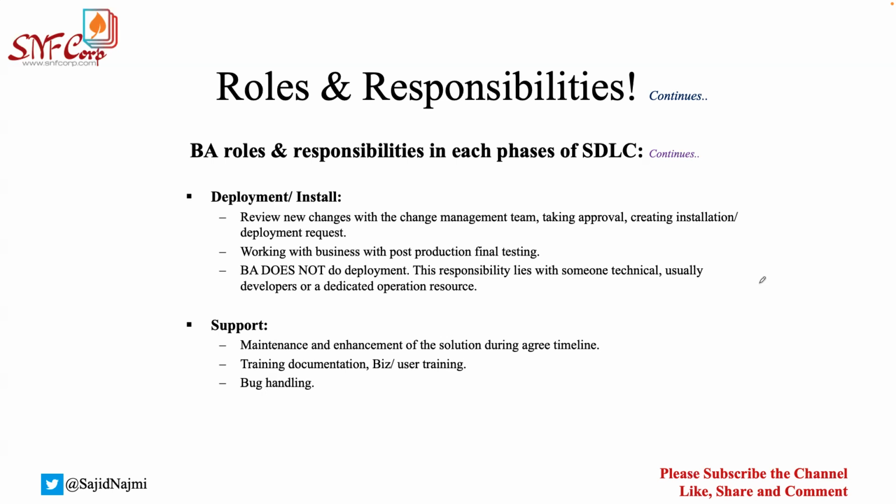So you cannot simply go ahead and deploy things in the production. What will happen, you will have to raise a request in their business environment, and there's a group of people who will review the changes, they will invite you to the meeting, and you will have to explain what we have done and what the impact is, what different systems this is going to impact. And all those system owners have reviewed this requirement with you and have approved already. So after looking at all that data and facts, the team will either decide to approve or reject the changes, and they will let you know what next.